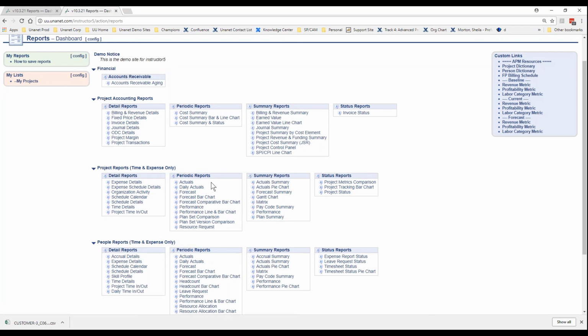Great. Okay, with an unbillable task, can it be excluded in the data on a billing invoice? Yes, if you have a task and you have identified that as a non-billable item, then when you're pulling that, you can exclude that information. That's the nice part about using the project task and the billing type. So even if it's a cost plus, but it's a non-billable project type, you can pull that in when you delineate that over on the billing side.